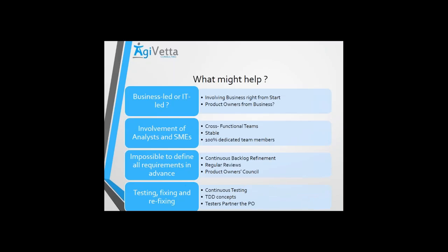So let's first talk about how we involve business. When Agile practices talk about customer collaboration, that means even when you are initiating the project, when you are writing your first backlog, or even the first set of requirements, involve the business stakeholders and end users right at that point of time. Yes, you may not have all the requirements at that stage, as Zahid, you also questioned.